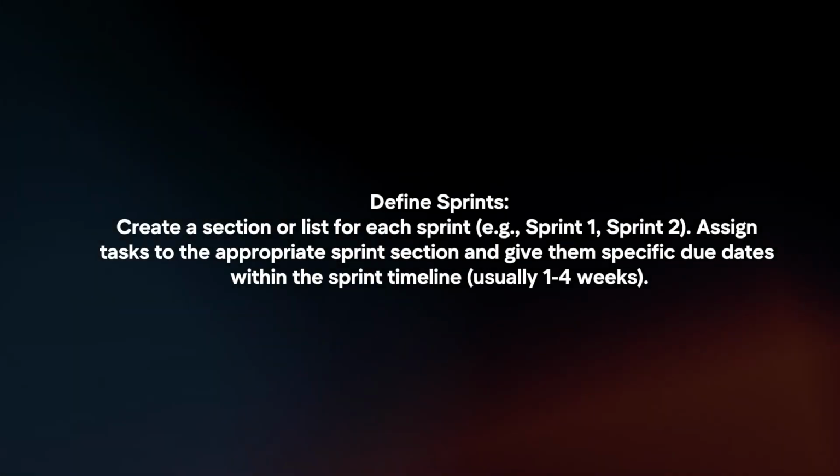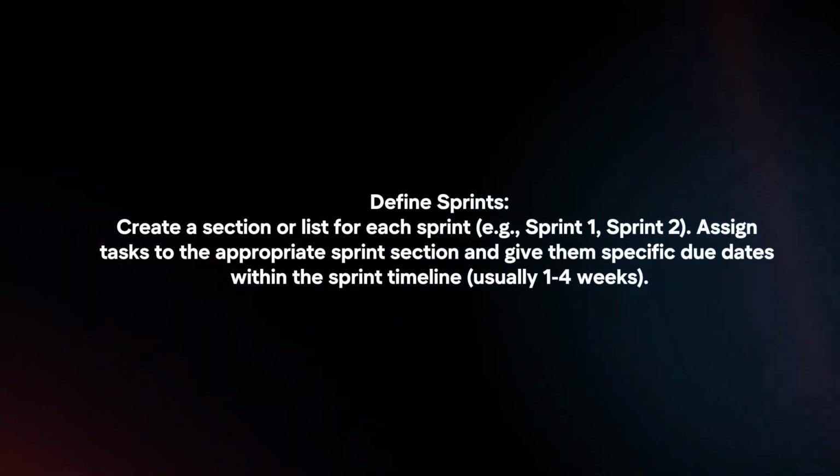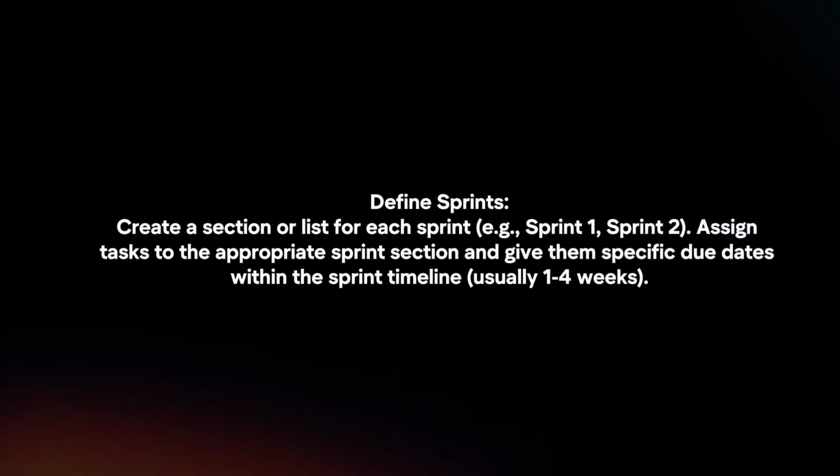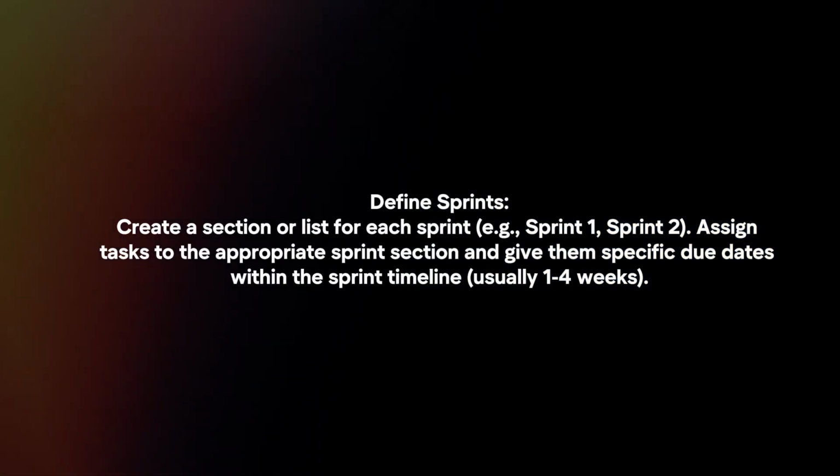Define sprints. Create a section or list for each sprint. Assign tasks to the appropriate sprint section and give them specific due dates within the sprint timeline.